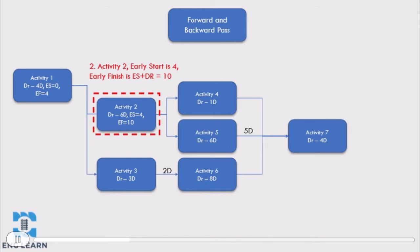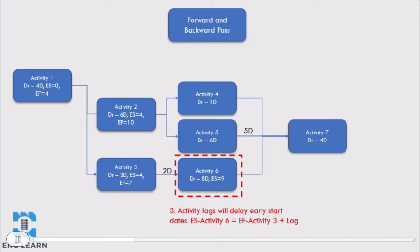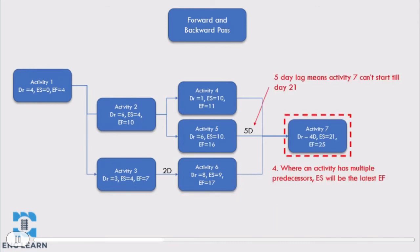We can calculate this for all subsequent activities using the same approach. The early start of an activity is the early finish of its predecessor. Where we have lags between activities, the early start of an activity will be the early finish of the predecessor plus the lag. So for activity 6, the early start is the early finish of activity 3 plus the 2-day lag. Where activities have multiple predecessors, as in the case of activity 7, the early start will be the latest early finish of its predecessors plus any lag. The early finish for activity 4 is day 11, activity 5 is day 16 plus a 5-day lag which makes it day 21, and activity 6 is day 17. Therefore the early start of activity 7 is day 21.